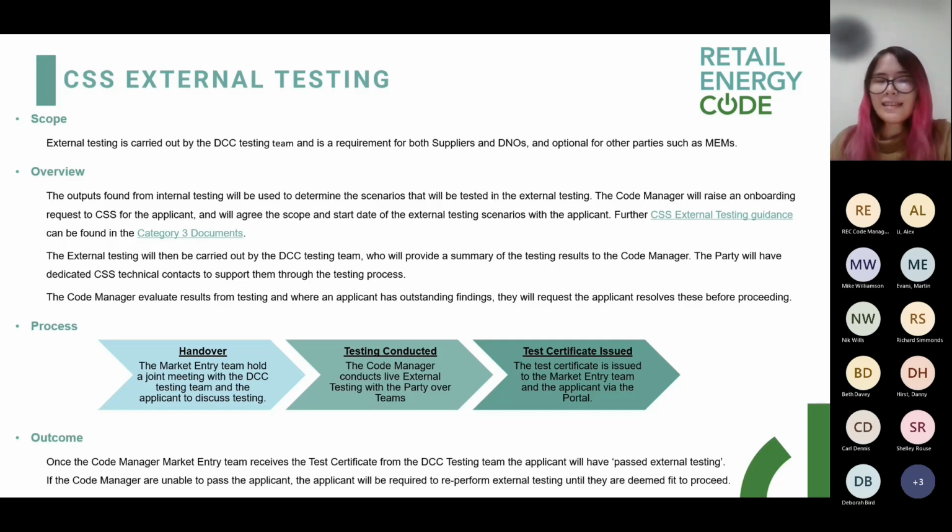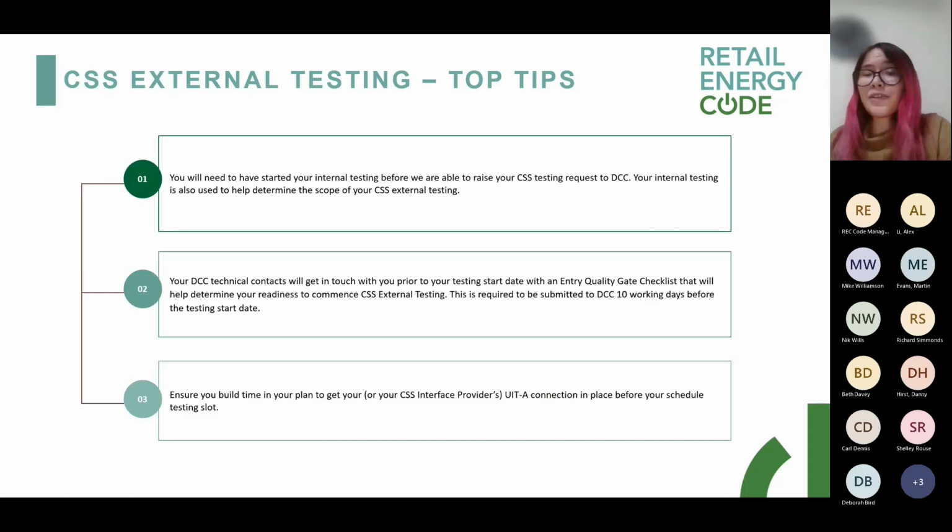If we then move on to the next slide, let's just take you through some top tips. So again, point one, as previously mentioned, you'll need to have started your internal testing before we can commence your external testing. So we'd definitely advise that you submit your internal testing documentation shortly after you finish your BSA. The internal testing, you might not have completed it. For example, you might still be going through some of the testing stages, but at least if we can understand what your scope is, that can help us with the initial raising of the request and initial outline of what the scope is expected to look like, so that DCC can prepare accordingly.